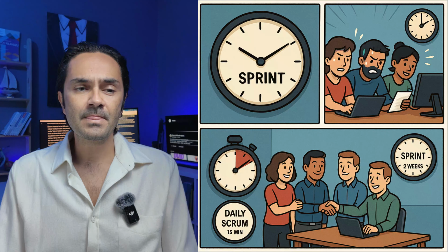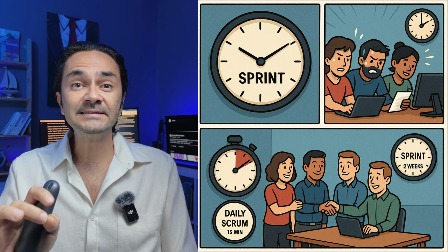When the 2 weeks are over, the sprint ends, even if everything isn't completely done. After that, the team reviews what they finished, gets feedback from the customer, and then plans the next sprint to keep improving the product. We also use time boxing for meetings.